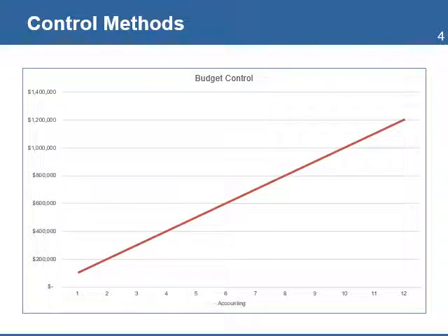The typical accounting reporting breaks down the budget into monthly reports. The total is divided by 12 months, and this information is used as the baseline to monitor the budget. But this information does not reflect the actual performance of the project, which has different dynamics on how the budget is actually used.